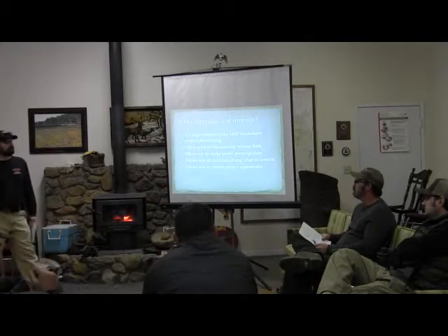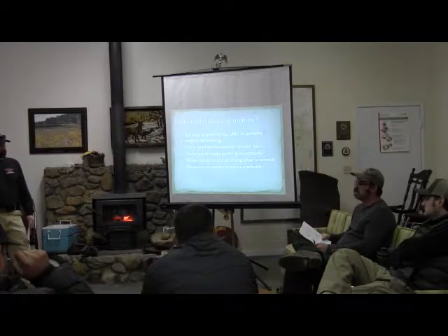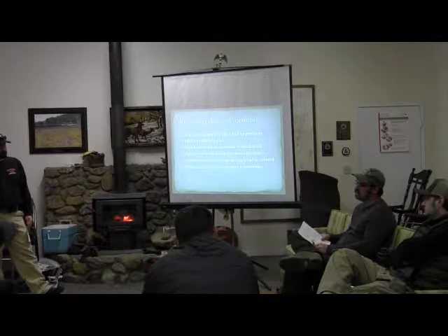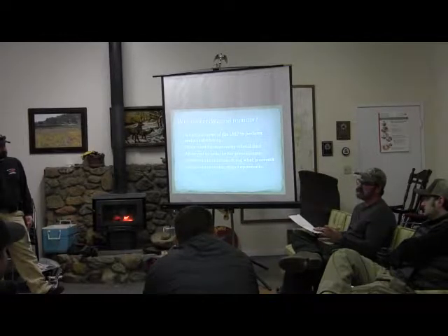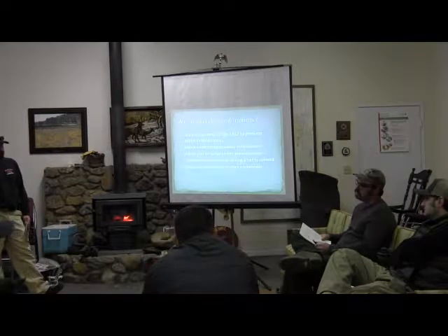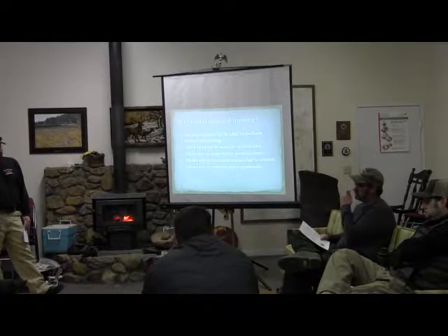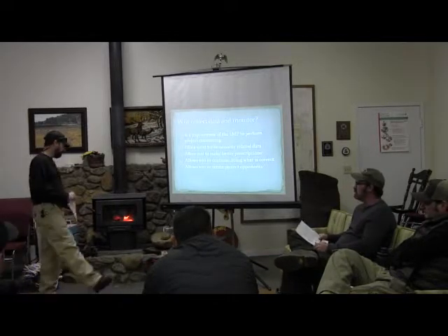What was interesting, thinking of it as monitoring now, is, I don't know if it came from you or whatever, but the fuel shop on our district is taking the daily PAL levels and averaging them out. So when they do contracts stuff, they can say, the month of August has a 5-year average of 10 E with the variance days. Yes. And I just now thought of that as a sort of monitoring for, not prescription, but for project fulfillment things. Well, the number of days you'd actually be able to work. Yeah, to help estimate project lengths.